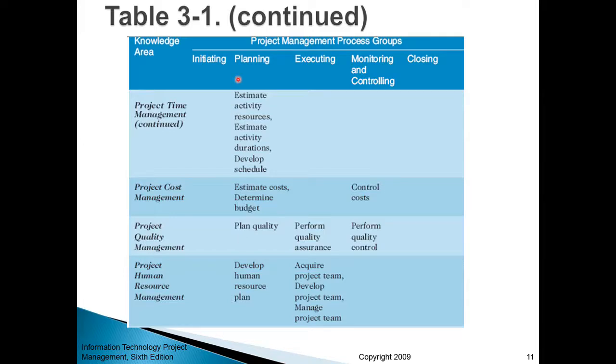Also, when you create a plan for a particular project, you will develop a human resource plan, meaning the kind of people you will need, the kind of specialists or professionals you will need for your project, at what points of time and to what extent. Meaning, are you planning to involve them full-time at a particular stage or part-time? Or do you need several full-time specialists or quarters, let's say? So all this requires knowledge in project human resource management.